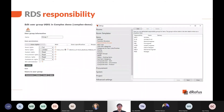The user permissions can be customized based on areas of responsibility, to ensure that different stakeholders do not edit each other's information. For example, the architect controls the room name and number and the engineer cannot edit this. Likewise, the fire engineer defines the alarm quantities and locations and the architect cannot edit this.